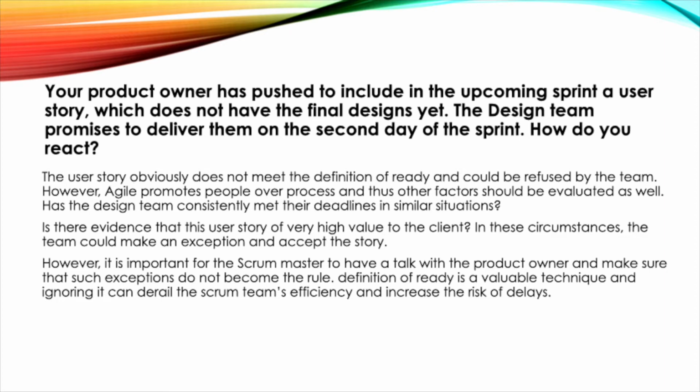In these circumstances, the team could make an exception and accept the story. However, it is important for the Scrum Master to have a talk with the product owner and make sure that such exceptions do not become the rule. Definition of ready is a valuable technique and ignoring it can derail the Scrum team's efficiency and increase the risk of delays.